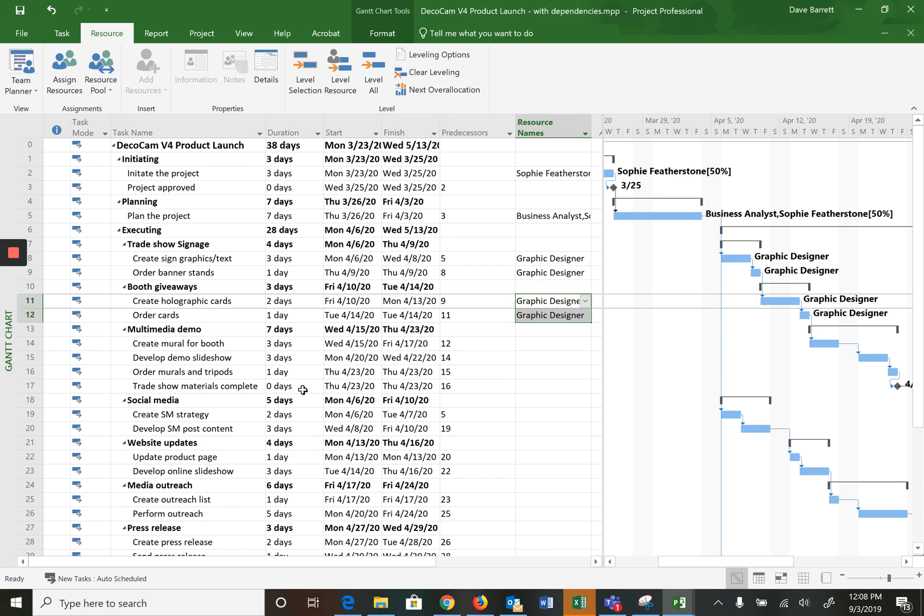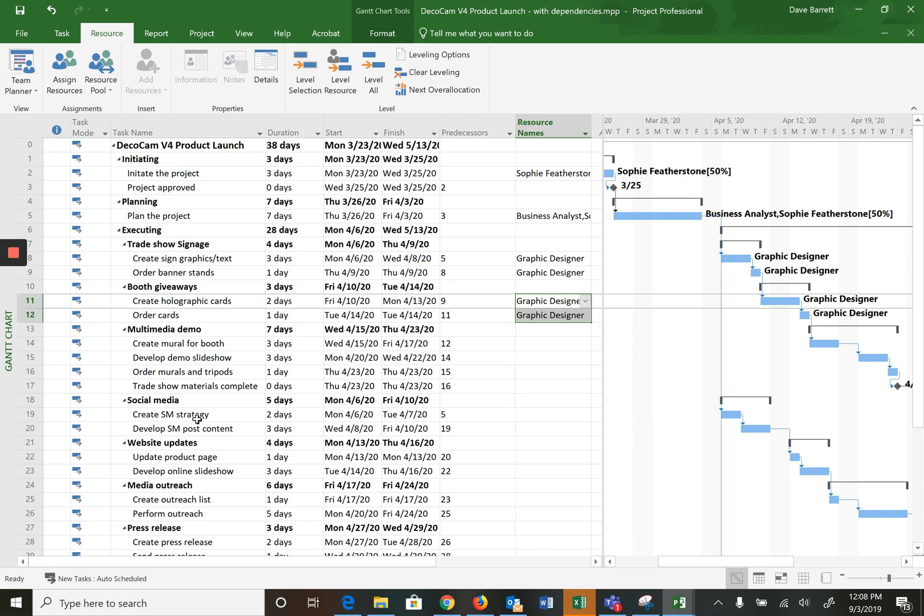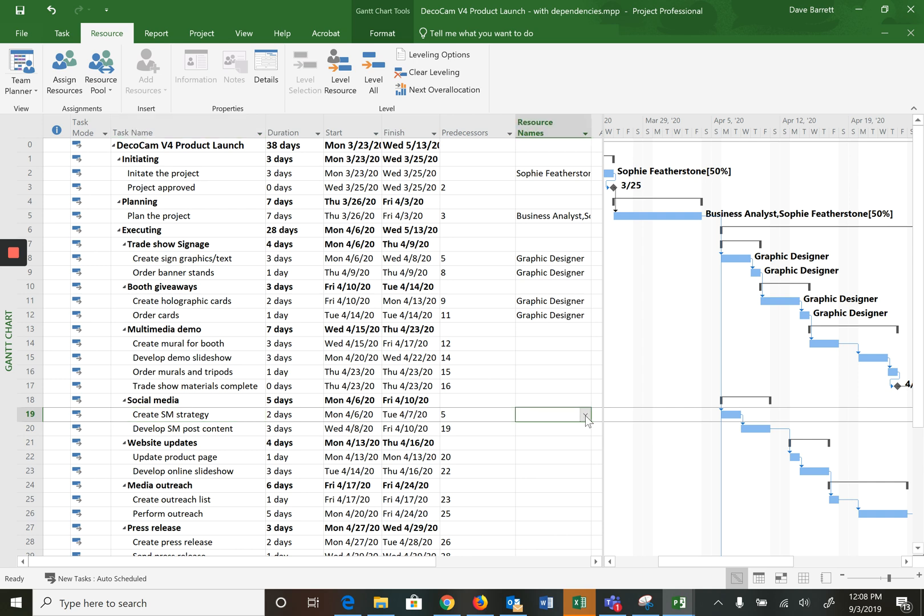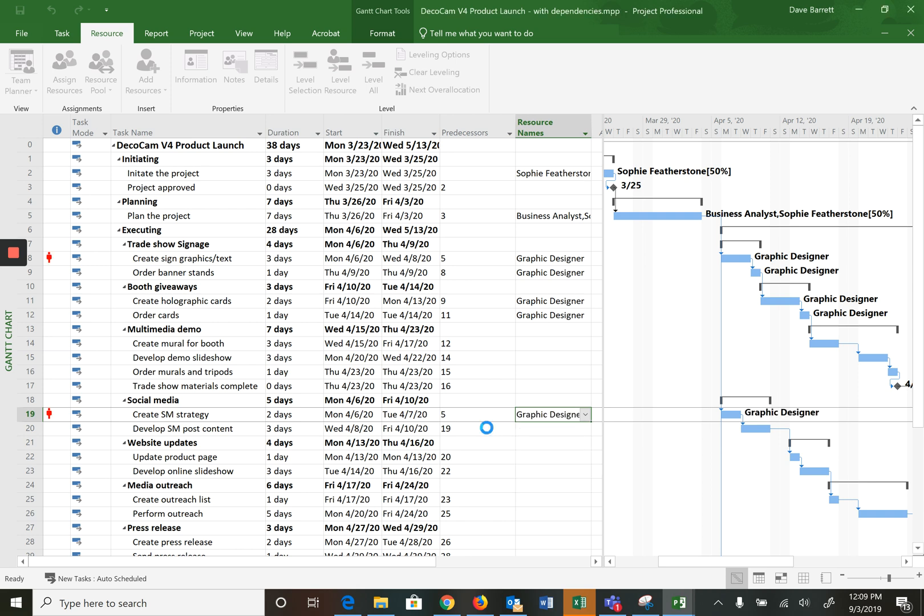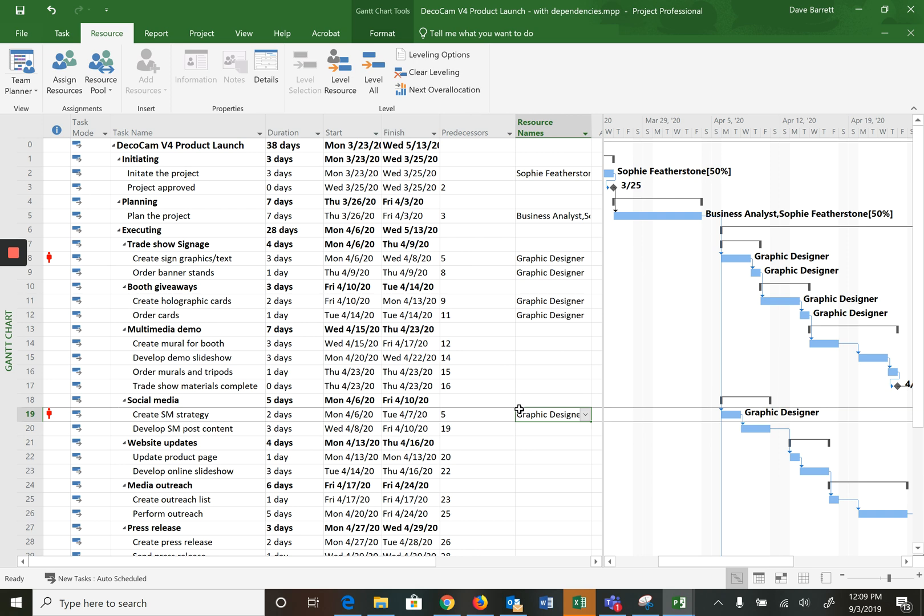Now here's a little thing that you can run into. For example, let's jump down to create social media strategy. Now in this case, for this task, the communication specialist is supposed to be assigned to this. But let's say we either make a mistake or we think, hey let's assign the graphic designer to this. So if we try to do this, watch what happens. So we get this little red person that shows up in both this task and this task.